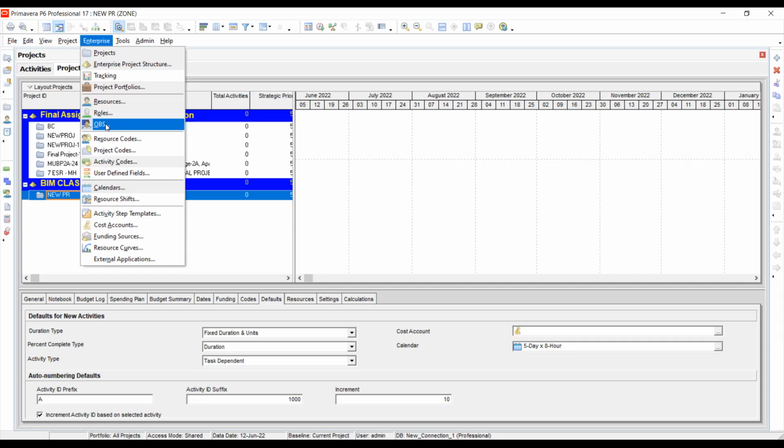So the enterprise project structure and the OBS are linked. There's a relationship between both, because based on that we allocate the responsible project managers. I also told you that this is a kind of ERP system. When we allocate the enterprise resources and OBS, we can restrict access.